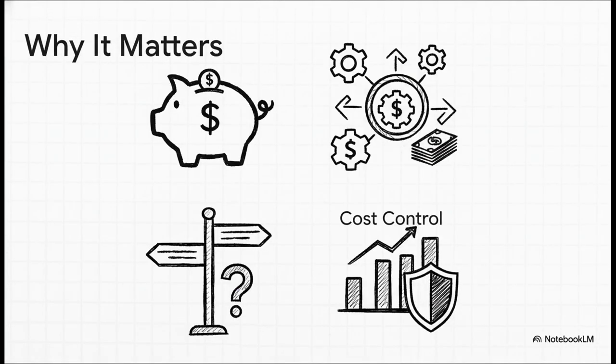So why is this such a big deal? Well, think of it like this. A good cost estimate is the foundation for your whole project budget. It tells you how to slice up the pie and allocate your funds. It's also that first big hurdle for decision makers. It helps them decide if a project is even worth doing from a financial standpoint. And once you're up and running, that estimate becomes your baseline, the ruler you use to measure all your spending to keep things from going off the rails.